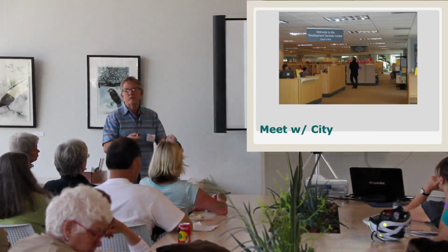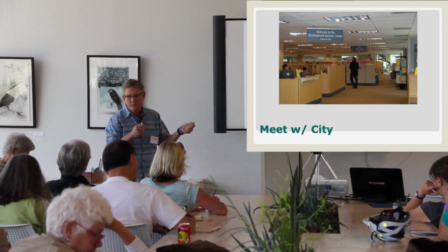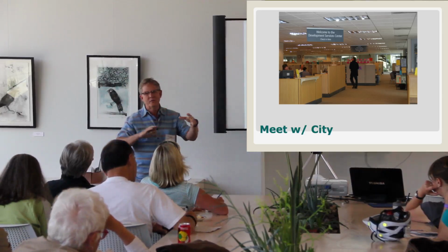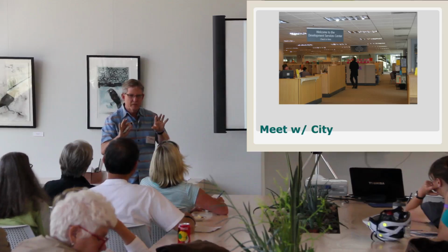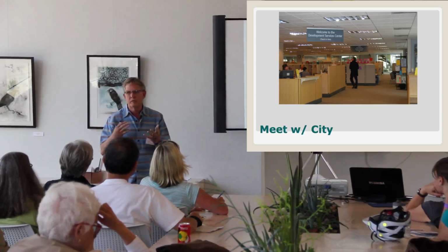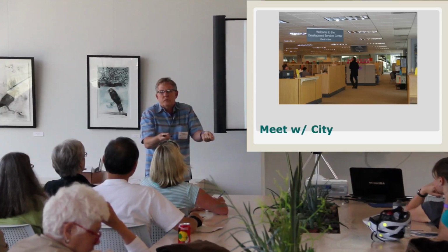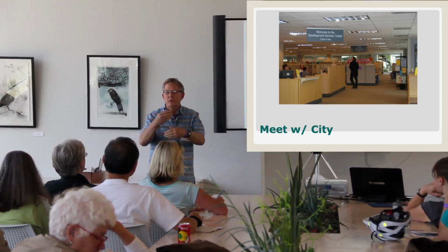I take those down to the city, and once I go over that with you, there's a lot of back and forth with the design. Can you do this, can you do that, can you do windows here, can you add a door here, and on and on. Once we get to a good concept, it's not set in stone, I take it to the city and go over it with them, over the counter, non-binding, and say, this is what my customer and I are proposing to do. Do we meet all these guidelines? And she opens the planning book and we go through it.